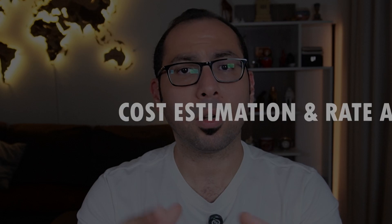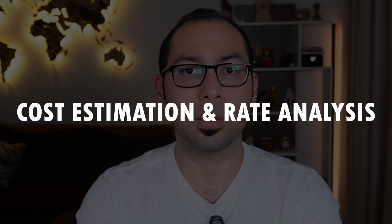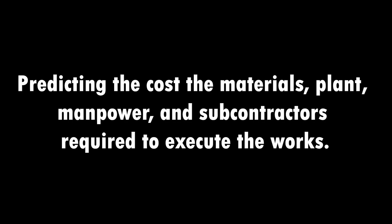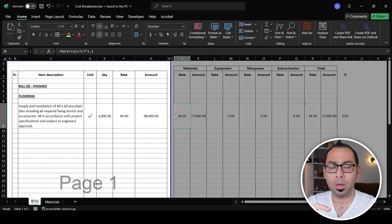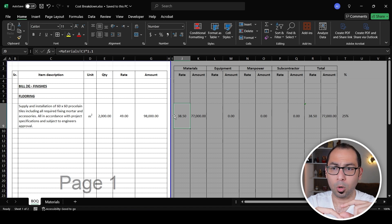Step number three is cost estimation and rate analysis. Cost estimation is predicting the cost of the materials, plant, manpower, and subcontractors required to execute the work. For each item in your BOQ, you calculate or estimate the cost of materials, plant, manpower, and subcontractors needed to execute that item. I have detailed videos linked in the description showing you how to do this process efficiently, including the template you need. I'll also leave a link to that template in the description so you can download it.